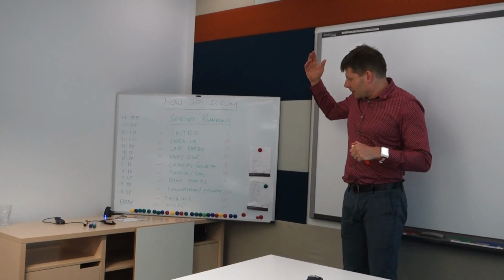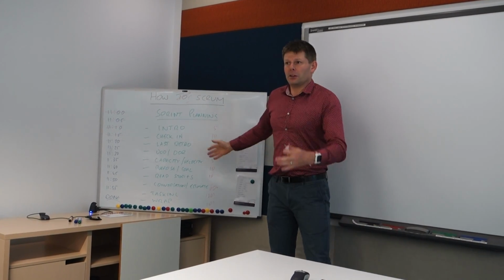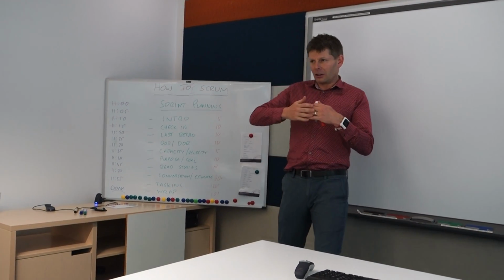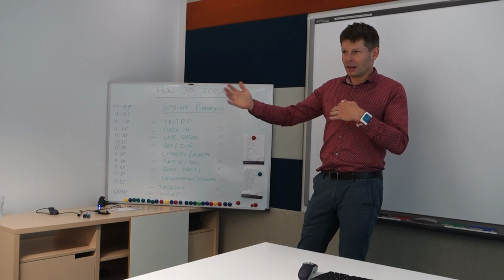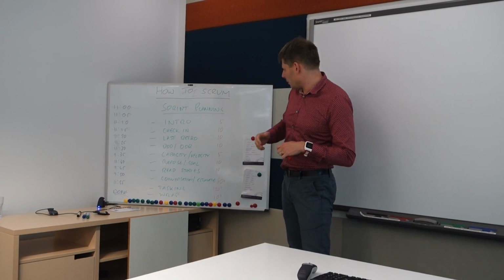So I'm going to guess last sprint we did 40 points and we'll ask the team, and we'll either try and challenge ourselves and go a bit harder, or if we fail the sprint, go lower.